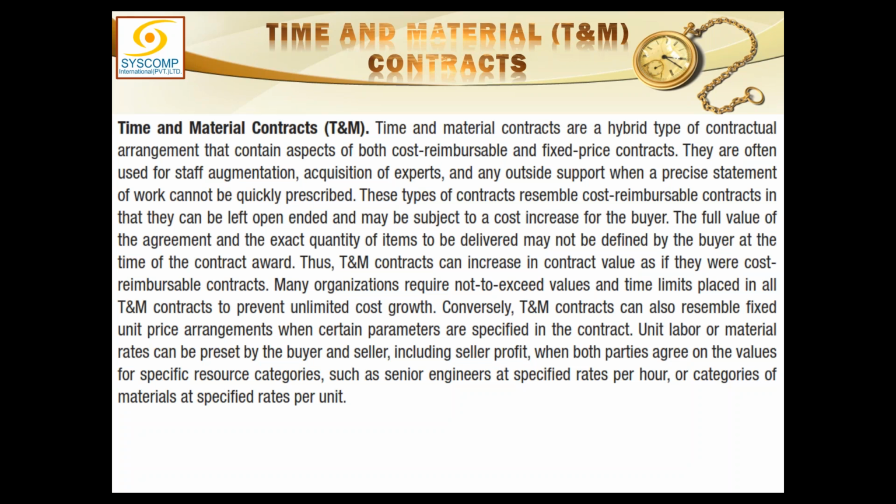So such short contracts would be priced according to the time and the material which is expended on that. For example, the consultant will be paid on hourly basis for as much time he spends on the contract.